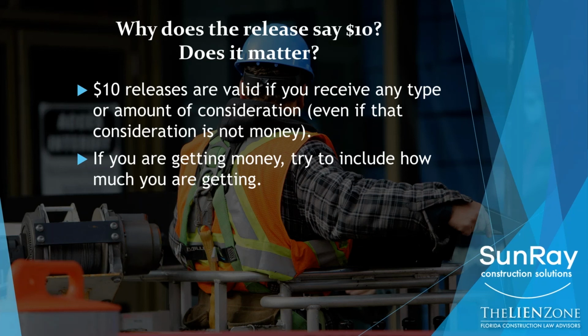Even, by the way, of the consideration that you receive, I should say, it's any amount of consideration, even if that consideration is not exclusively money. Maybe you gave up other rights. You don't always have to get money in exchange for a release for that release to be valid.